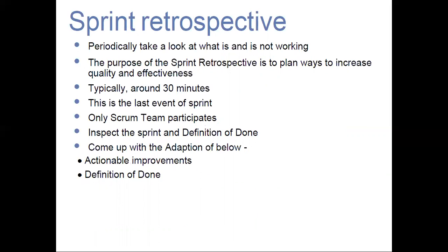Now, let's have a look at the sprint retrospective. In the retrospective, we periodically take a look at what is working and what is not working. The purpose of the sprint retro is to plan ways to increase quality and effectiveness. It's typically around 30 minutes, and this is the last event of the sprint.